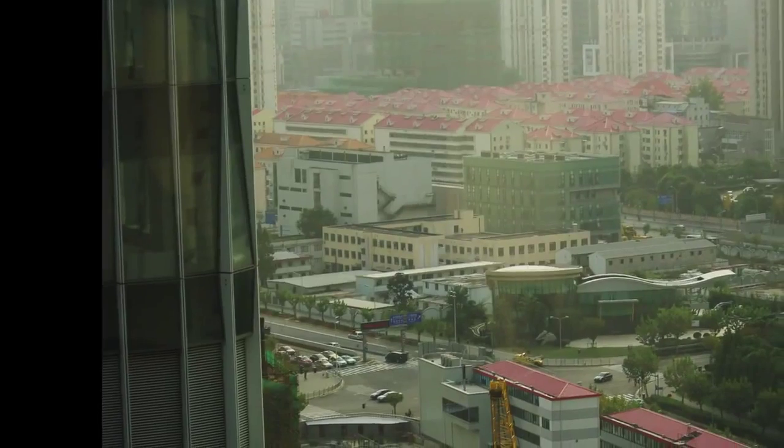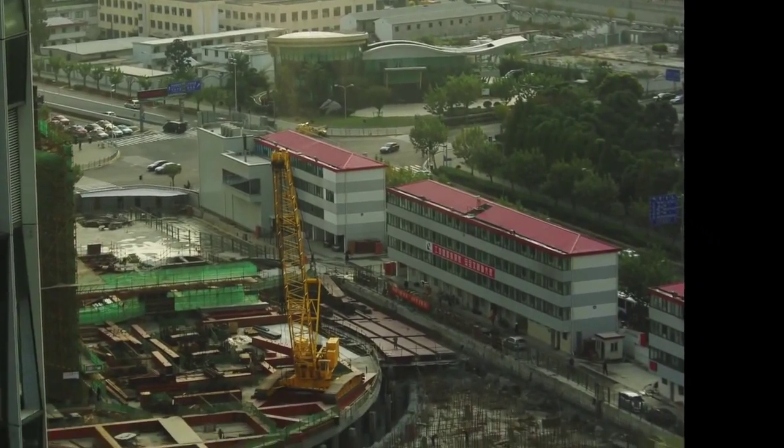So basically, to date, the tower from level 8 to level 115 is pretty much complete, superstructure and exterior wall. We can start doing the public areas, and now we have to focus on the very top, and we have to focus on the first five floors. So we've started to look again at the landscape around and make sure that is all in place, and that'll probably start in the next couple months, all the cladding for the ground plane, and the trees and the landscape will be put in. It's a very, very tight site. It's 30,000 square meters, and there's a perimeter of construction offices that wrap the site that now have to be removed and the ground plane put on.